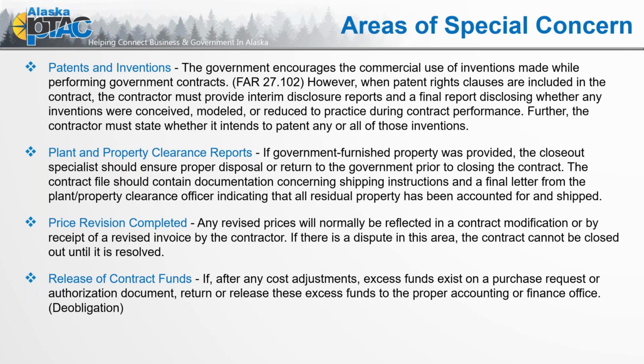And here, specifically, what they're talking about, this release of the contract funds on the agency side, is if there are any excess funds that have no claim to them, then of course there is that deobligation process for the contracting officer to go through and close out. And waiting on or working with the contractor as they're verifying, in my mind that's part of that whole release process: yes, we have been made whole, no additional funds are needed, and there may be delays as both sides are looking to see, are those funds truly excess and can they be deobligated?